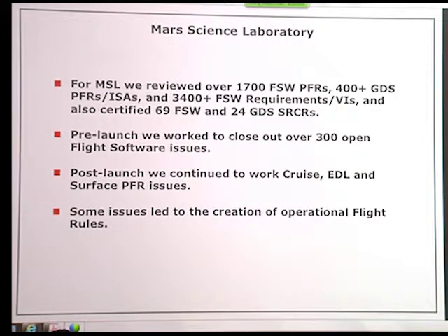So in MSL, these are some of the numbers that came out after we landed. We reviewed over 1,700 flight software PFRs, and also 3,400 flight software requirement PIs, and just closed out a lot of issues. It was a lot of work. Pre-launch, we worked to close out over 300 open flight software issues, and post-launch, we continue to work through some EDL and surface PFR issues.